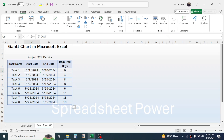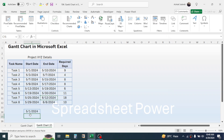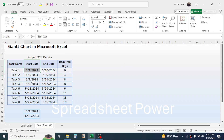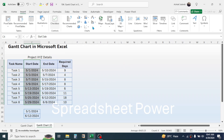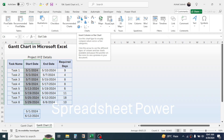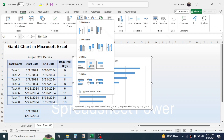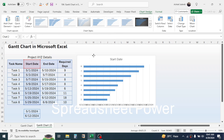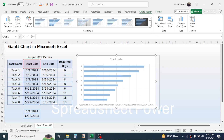Copy the starting date of the project and paste it in one cell. Then copy the ending date of the project, which is 12th June 2024, and paste it here. Press Escape to exit copy mode. Now select the start date range, click on the Insert tab, then click on the Column and Bar Chart option. In the 2D bar section, select the Stacked Bar option. This will create the bar chart. Increase the size of the chart by dragging from the corner.